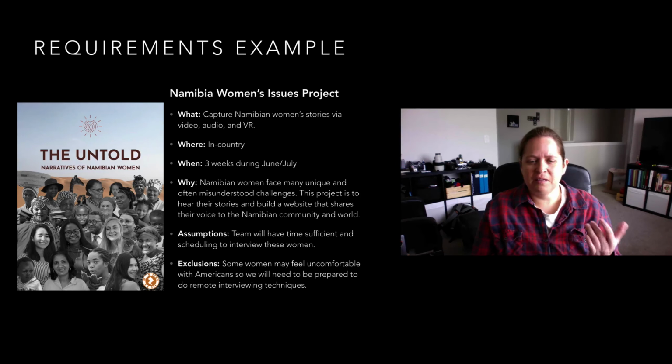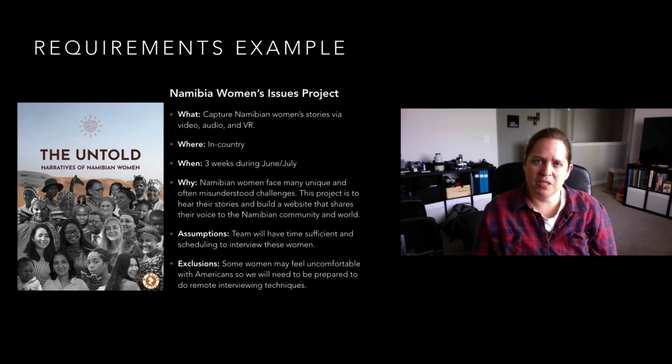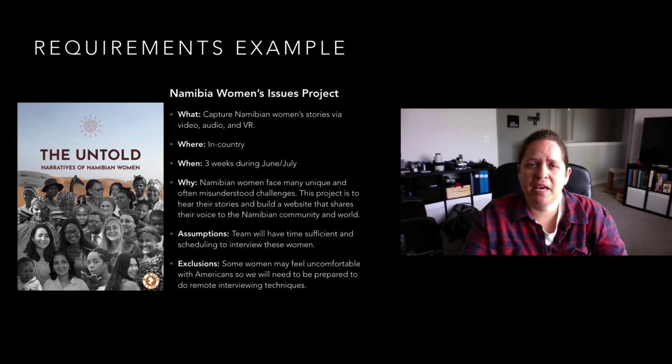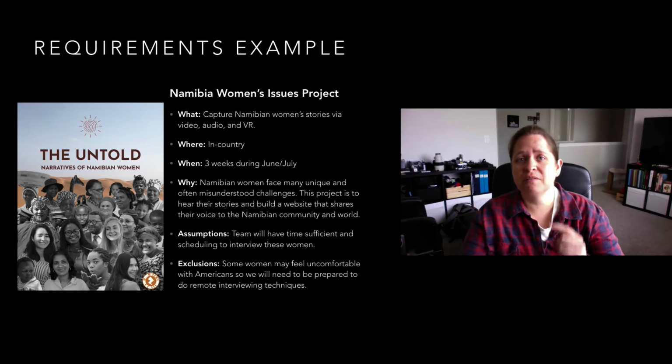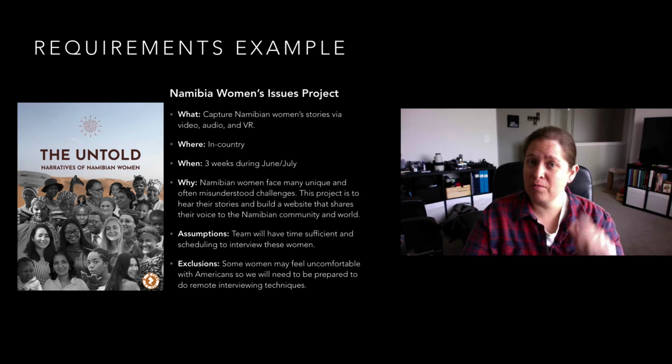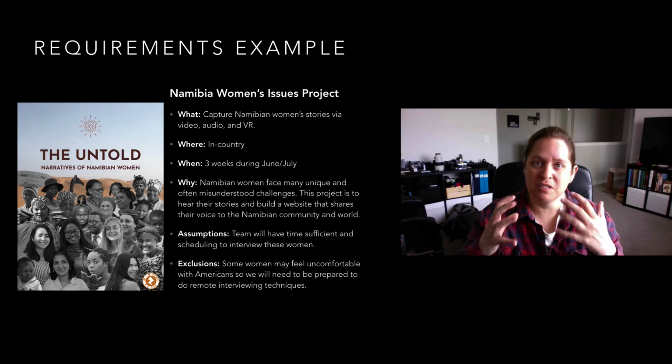I like that some people build in assumptions and exclusions, because, for example, if you're building an app and you want to include shipping, let's say the assumption is there's free shipping to all 48 states, but the exclusion would be not Alaska or Hawaii. So think about how you would use an assumption.